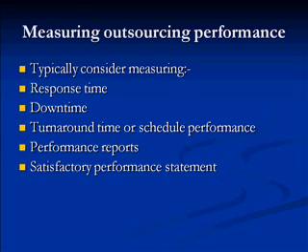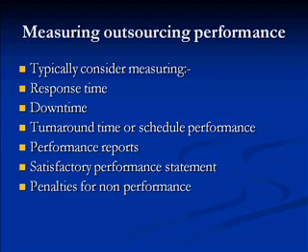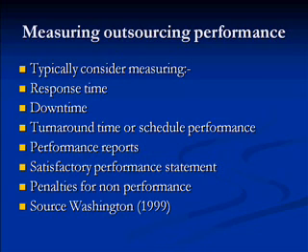Turnaround time or schedule performance? Performance report, satisfactory performance statement. Penalties for non-performance. So in this manner we can measure the performance of a supplier.